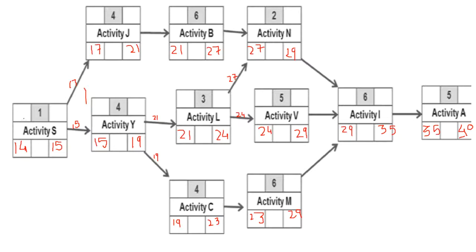So to calculate the early start time of the first activity, we will take this late start time and include a buffer of 5 days, because that's the allowed, and we could basically start this project on day 9.